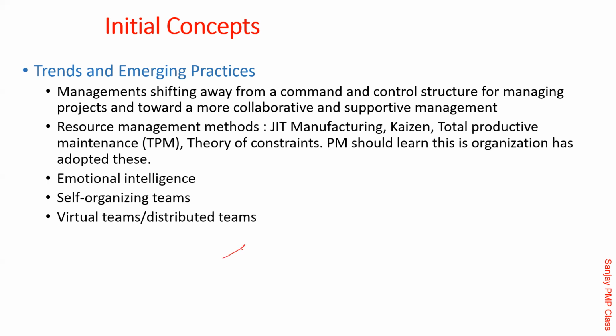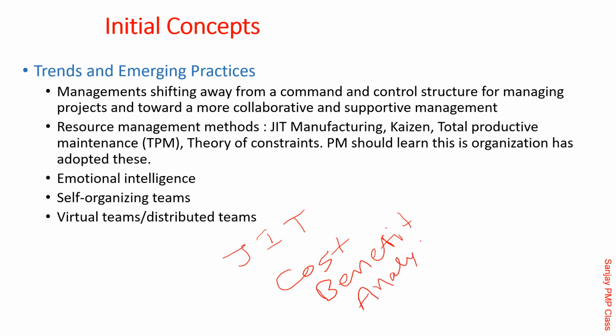See, when they are saying JIT is one of the methods of doing things, they are nowhere saying that there isn't another tool, which you have already seen so many times, Kiran. It is called cost benefit analysis. In this situation, you will have to do a cost benefit analysis. You will have some advantage of buying after 3 months, but there is a cost. On the other hand, there would be a cost of buying them early. Now you need to do this analysis.